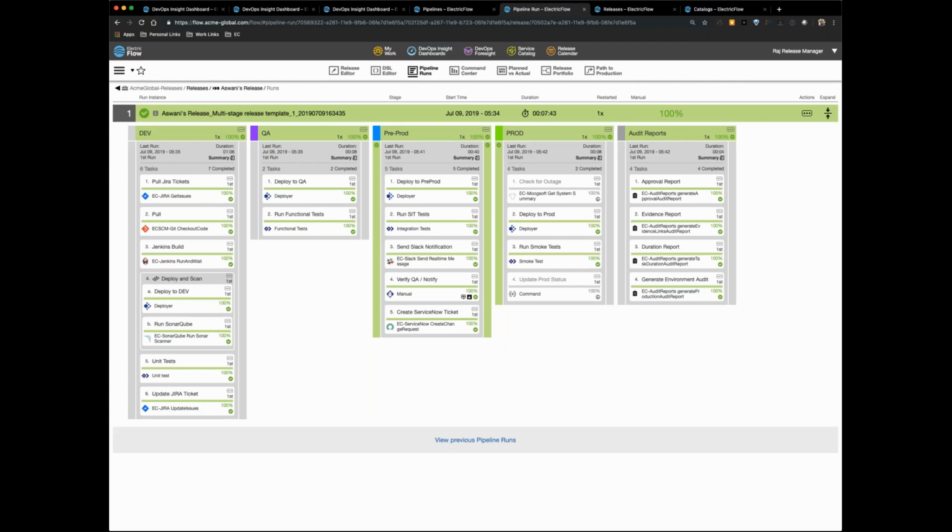All right, looks like maybe one more for now. How do you manage dependencies? We touched on dependencies earlier, right? There were two types of dependencies. One is the release level dependency, where you can tie one release to another, right? So in other words, if you recall, if release A has 3 or 4 applications and release B has 10 applications, you might have a dependency from an application in release A to an application in release B. And so now you have application dependency and release dependency, and those can be tied together in Flow.